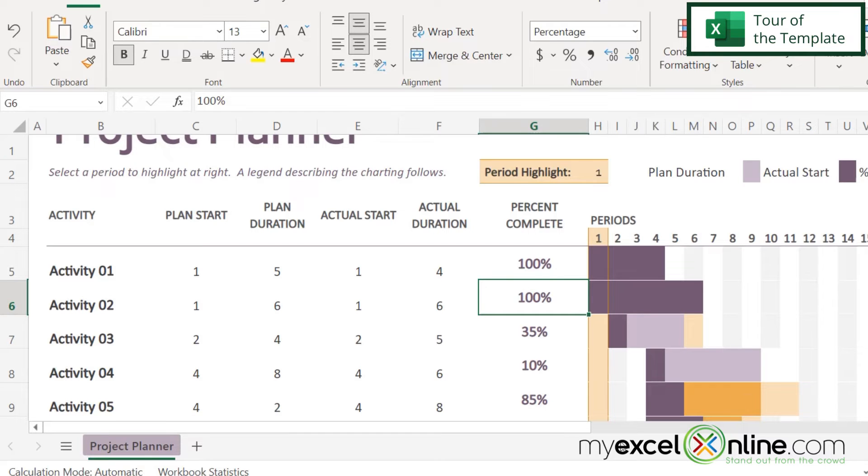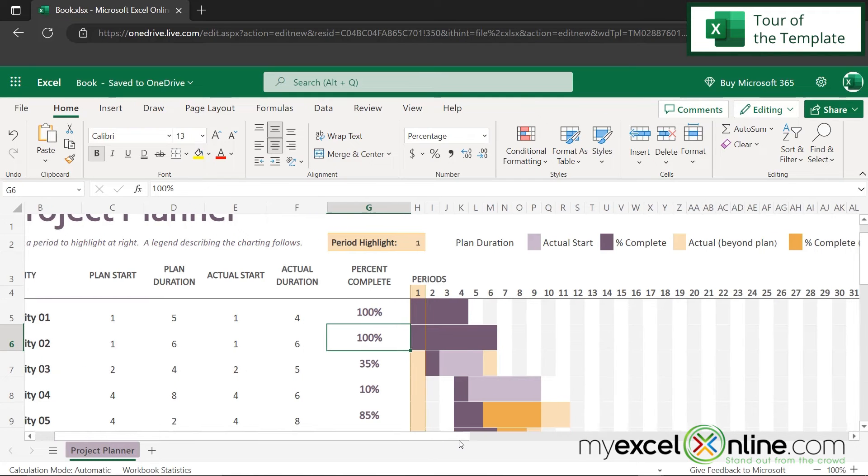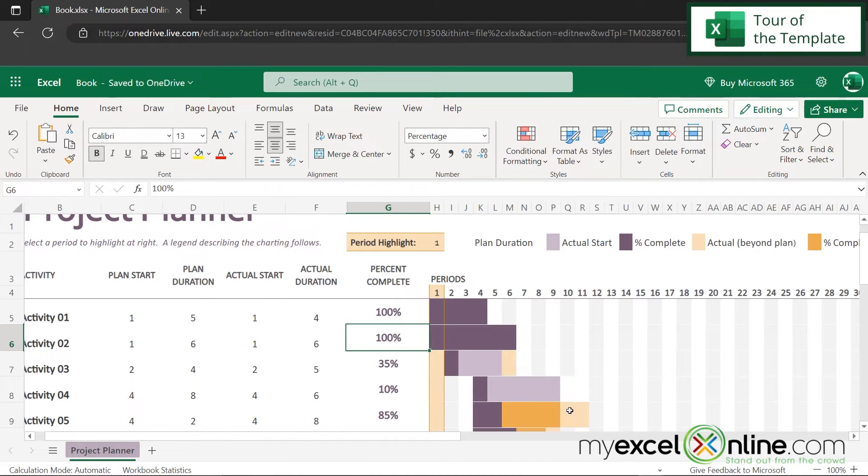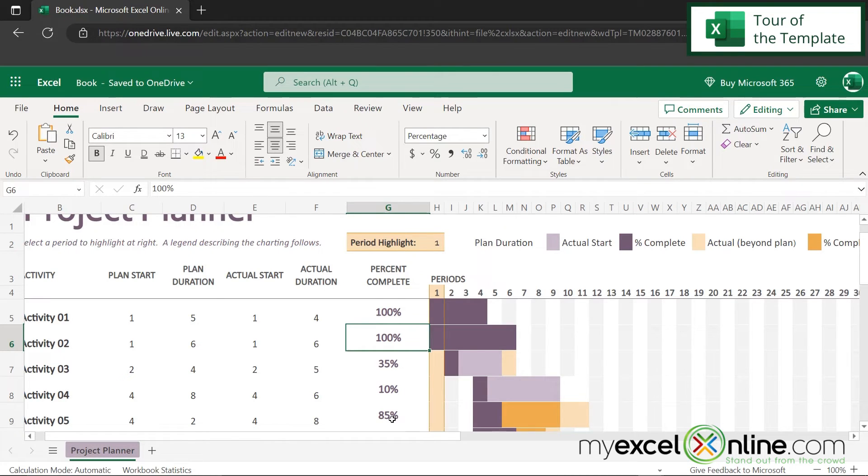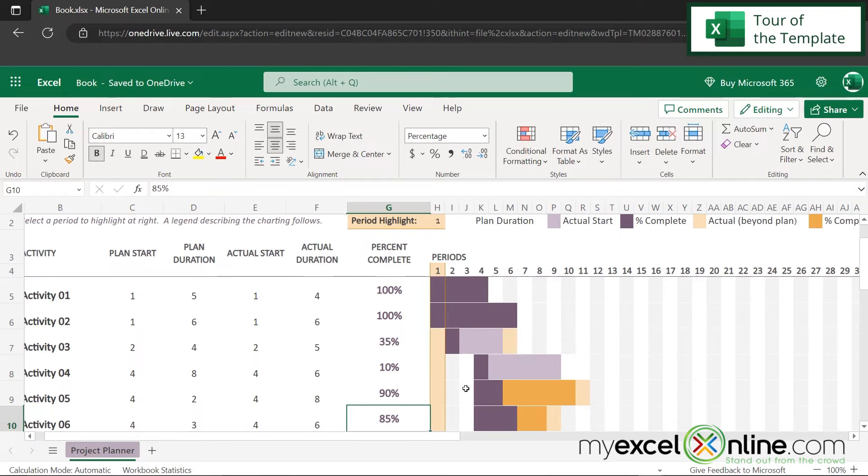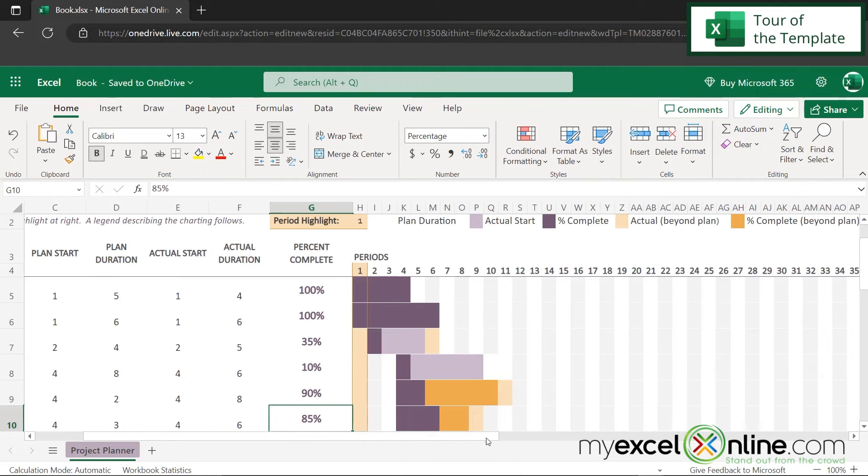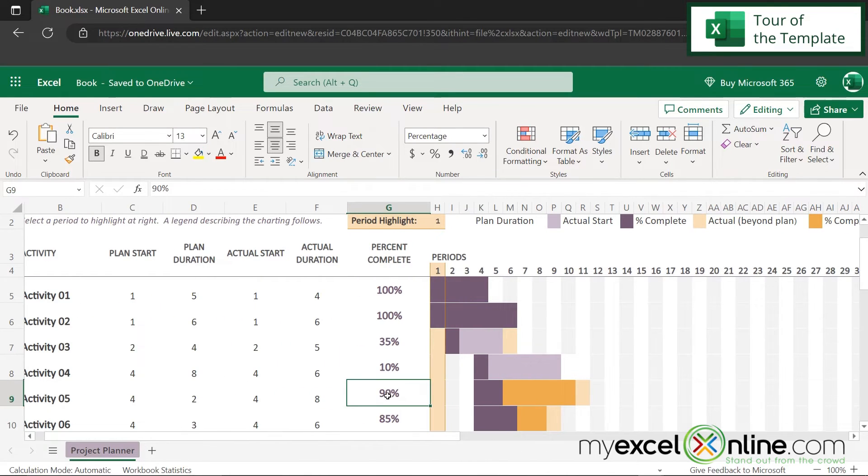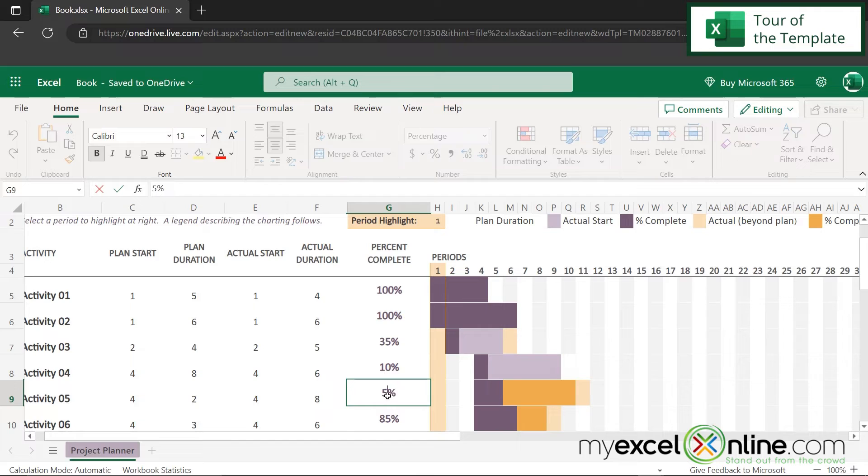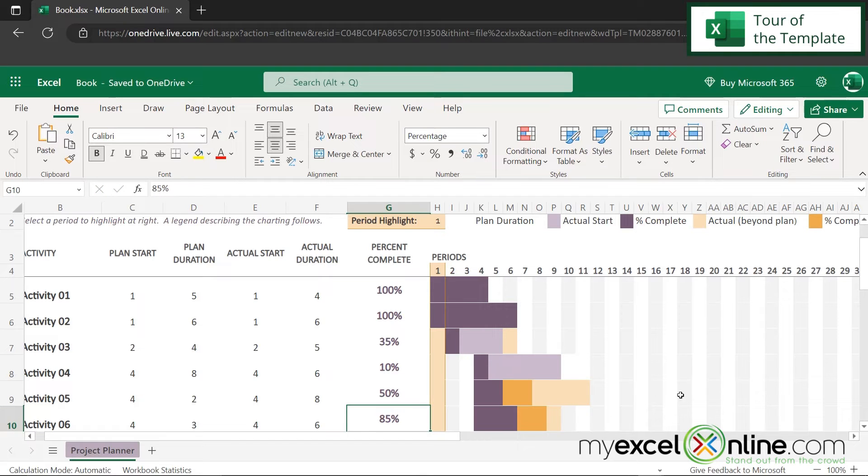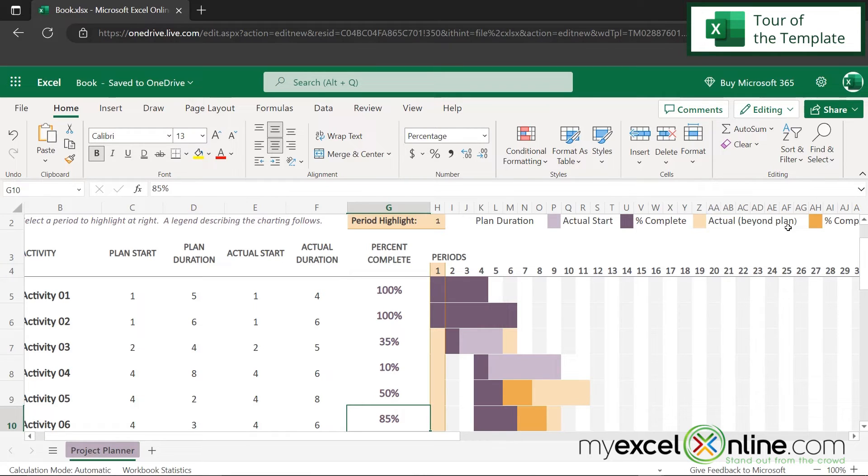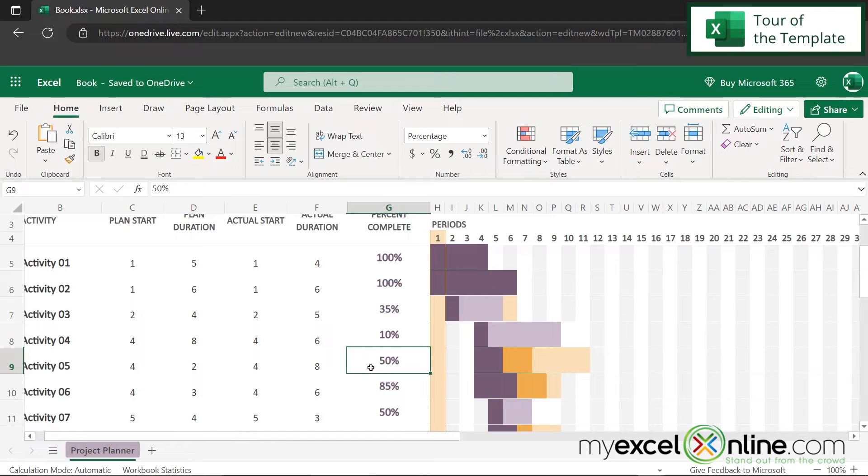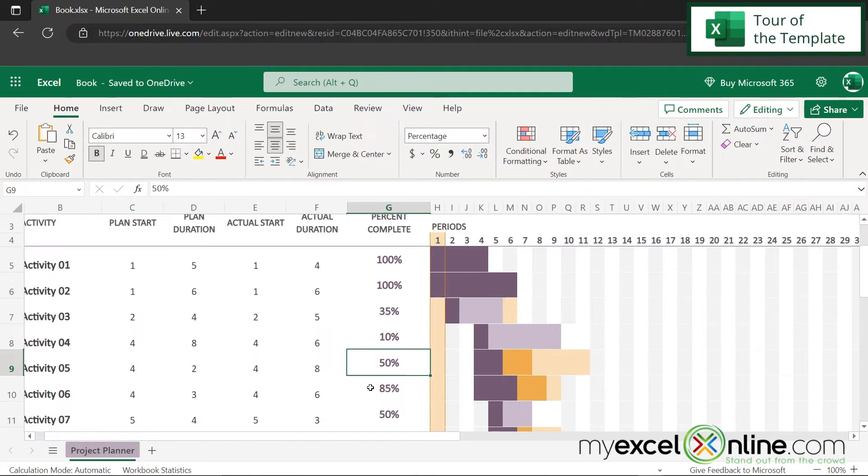But what are these three orange ones? I'm going to scroll to the right a little bit. And you can see that these are my percent complete beyond my plan. And then I have some actual complete right here that I have not gotten to yet. But if I were to change this to 90, you can see that I've now filled in another dark orange. That is my percent complete up here beyond my plan. And if I took this down to 50, you'll be able to see that I am only half done and I have half my task to go, but right here it is in the actual beyond the plan. So I know that my graph is being changed based on what percent I have done and how long my project is actually taking. So just keep those two variables in mind.